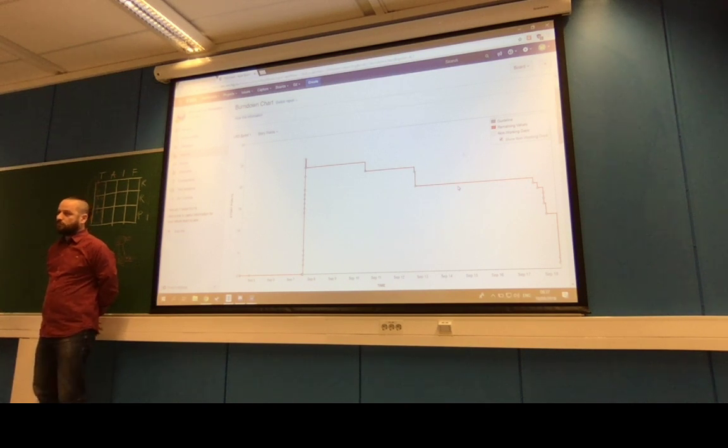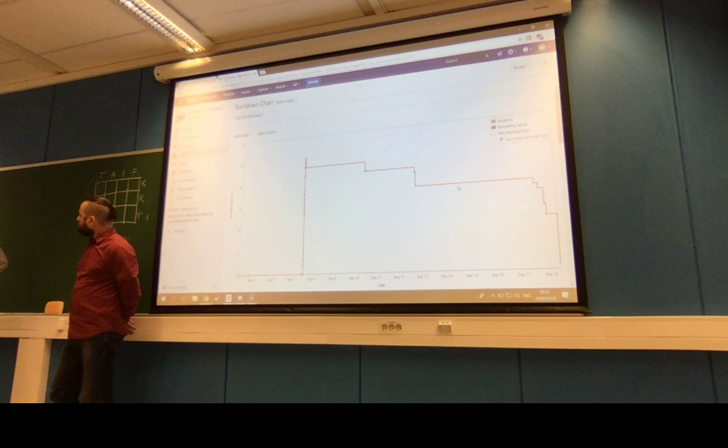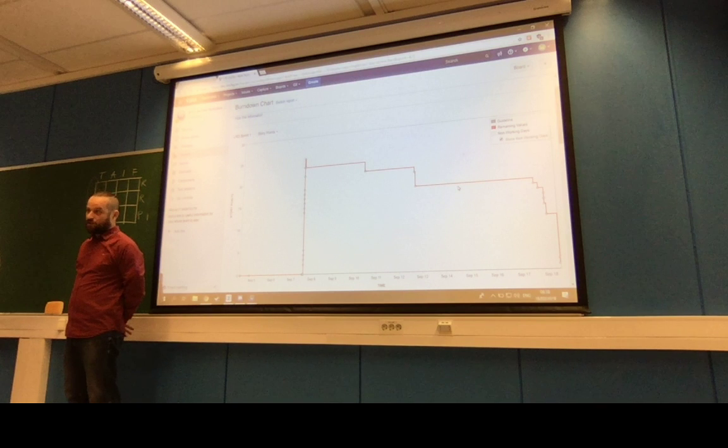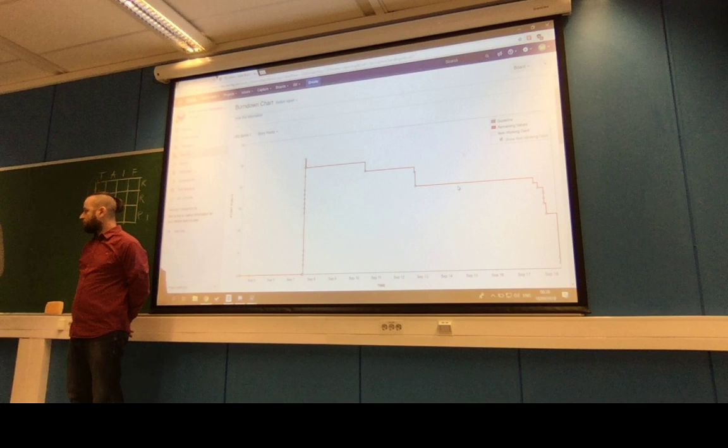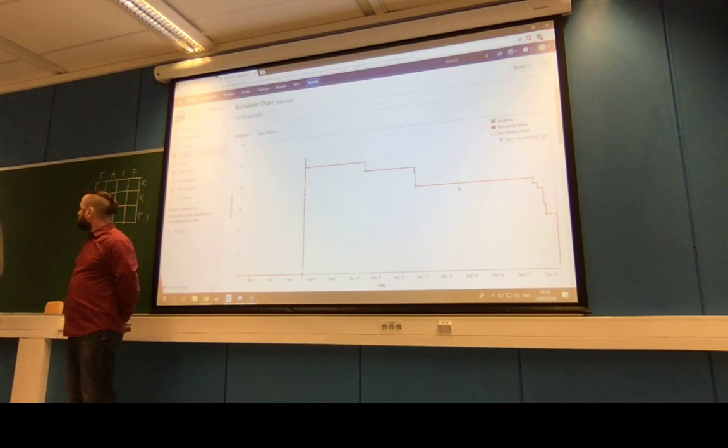And how about your estimates? Our estimates are kind of low right now. We could probably increase them, our story points. It depends on the tasks. I think some of the programming tasks were actually easier and quicker done than we thought at the beginning. The problem was that we started with the 4-hour story point. And some of the tasks didn't take 4 hours, but they can't give them 0, so they have to give them 1. So they seemed much bigger than they actually were. They were 0.5 point or 0.25 point, something. We might increase how many story points we use per week.